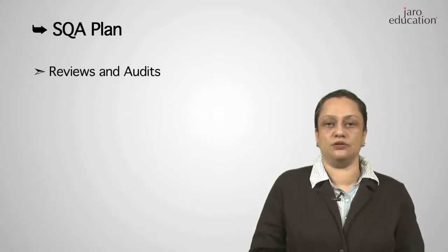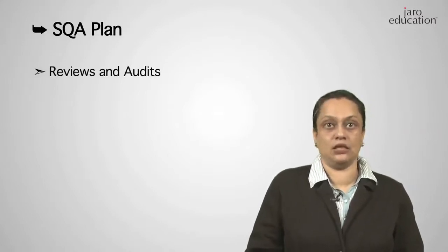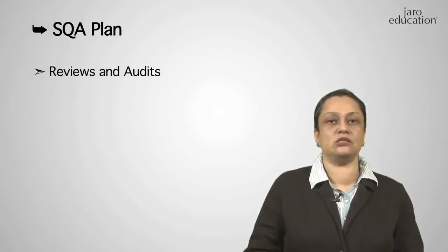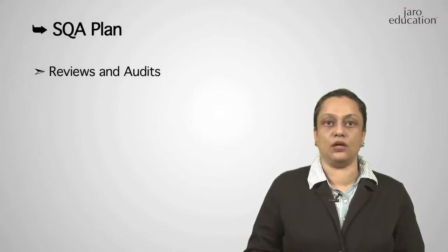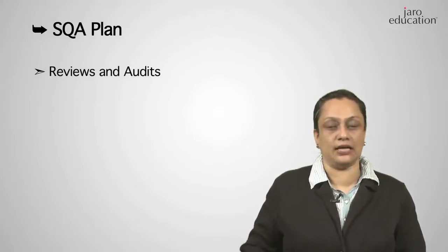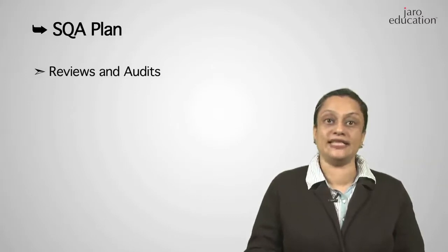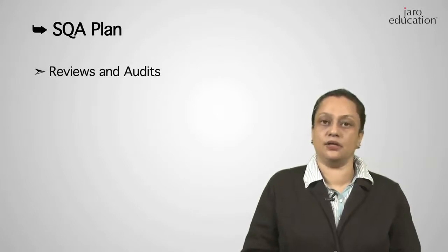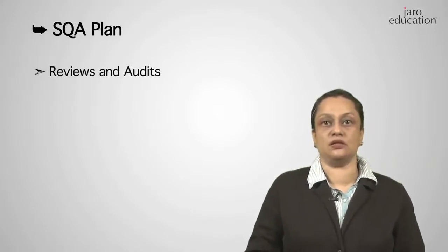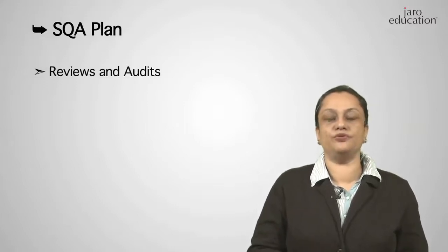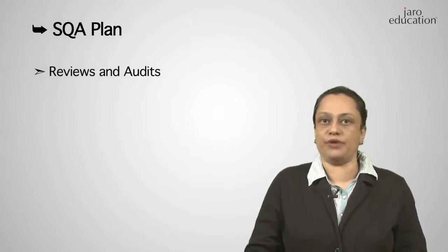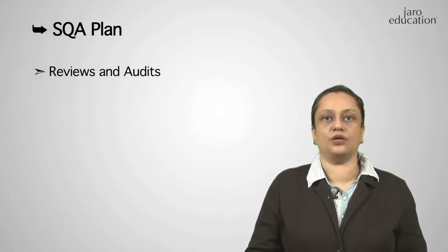Similarly for design, review of the design process, review of the test planning process, review of the coding process, review of the actual testing, the unit testing, integration testing, system testing, all sorts of testing: how are they being executed, are they being done as per plan. Will the SQA take a sample of the test cases and see whether the test cases are valid? All this has to be mentioned in the SQA plan. The SQA plan will also define the review of the documentation of the user manuals, the training manuals, and any other documents that are going to be used in the project.